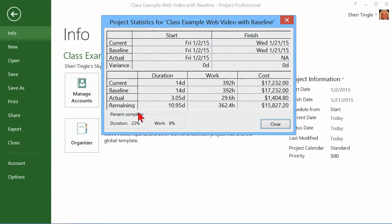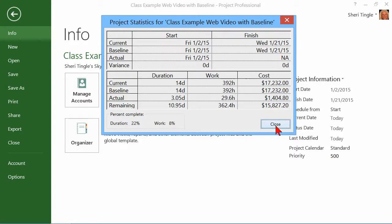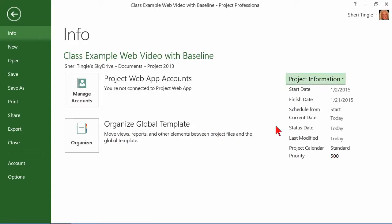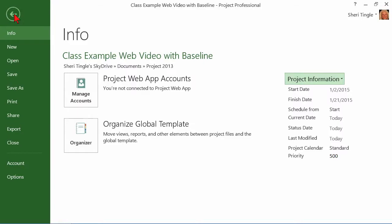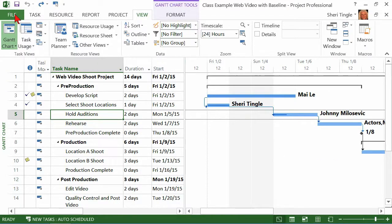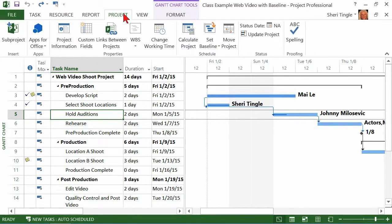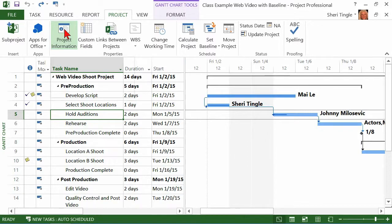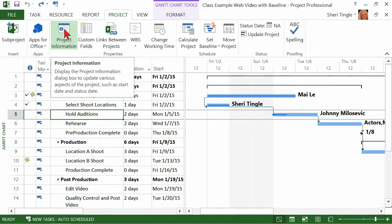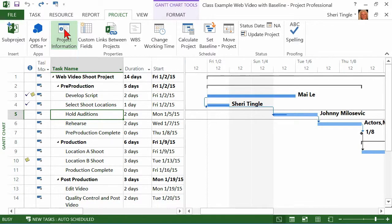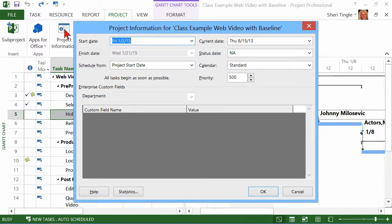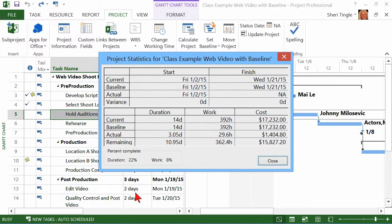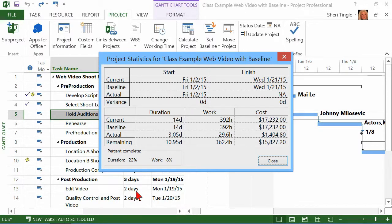That is a fantastic little window there that gives you a lot of great detail for your project. Oh, and by the way, I have finished 22% of the duration, the days, and I've finished 8% of the hours of work. So go ahead and click on Close on that one. Back to my project. You can also find on the Project Ribbon, Project Information. That same button there, but it's a little longer. So you hit Project Information and then Statistics at the bottom. And you click on Statistics, same dialog box. So it simply depends on where you want to access the dialog box.